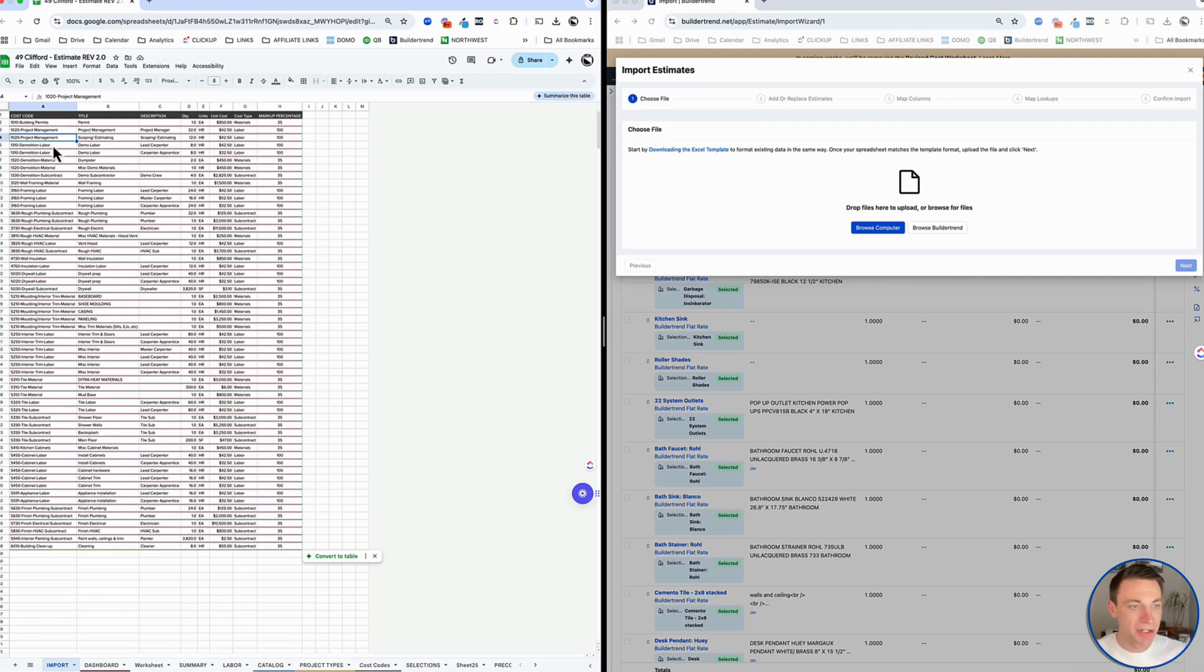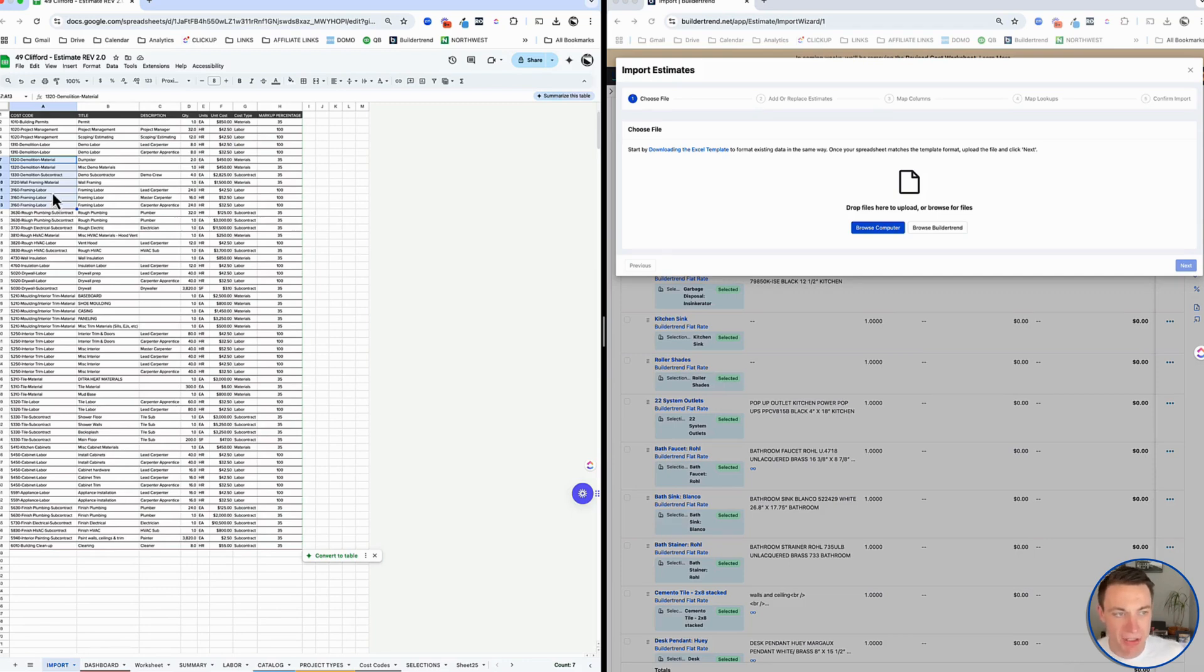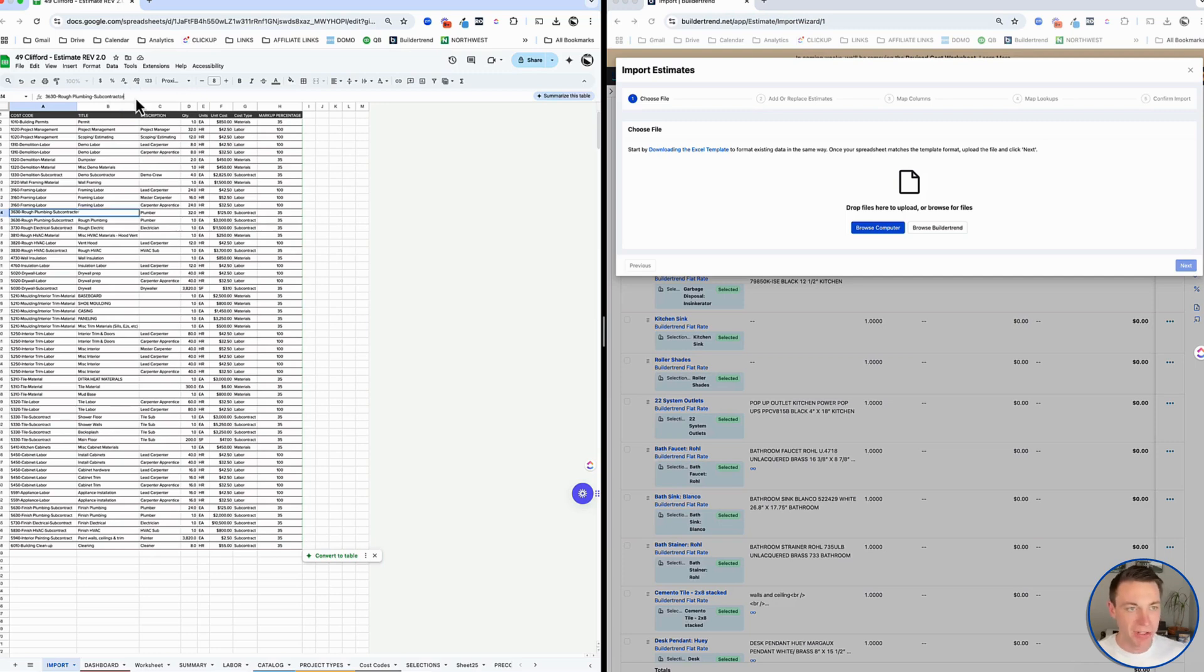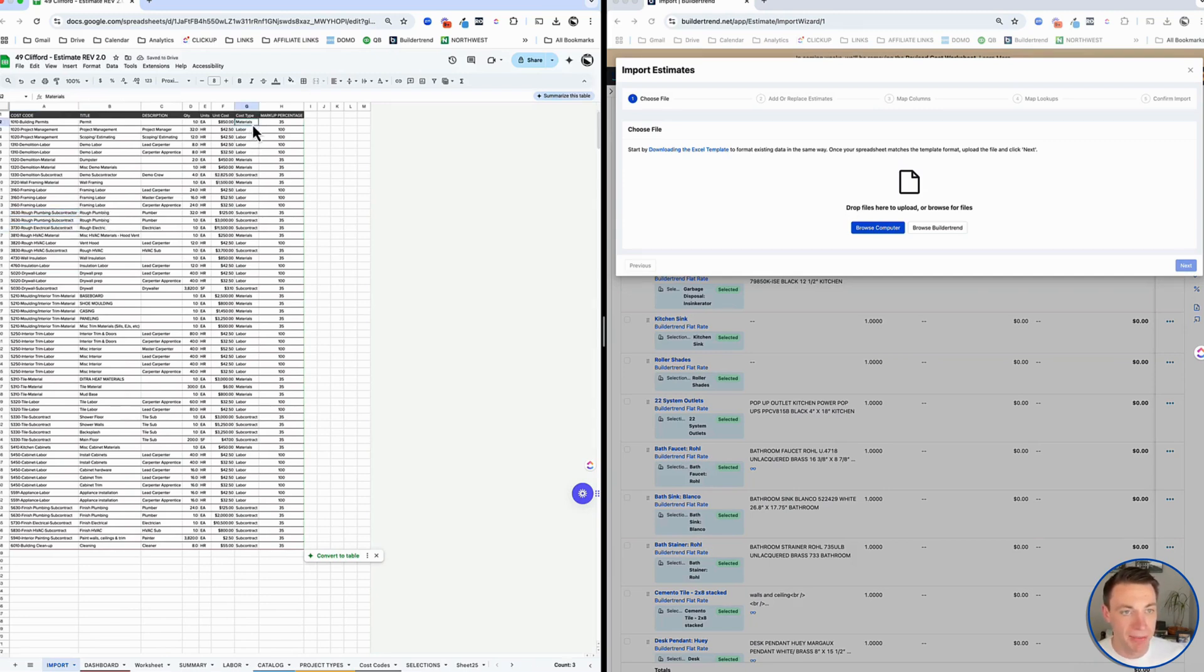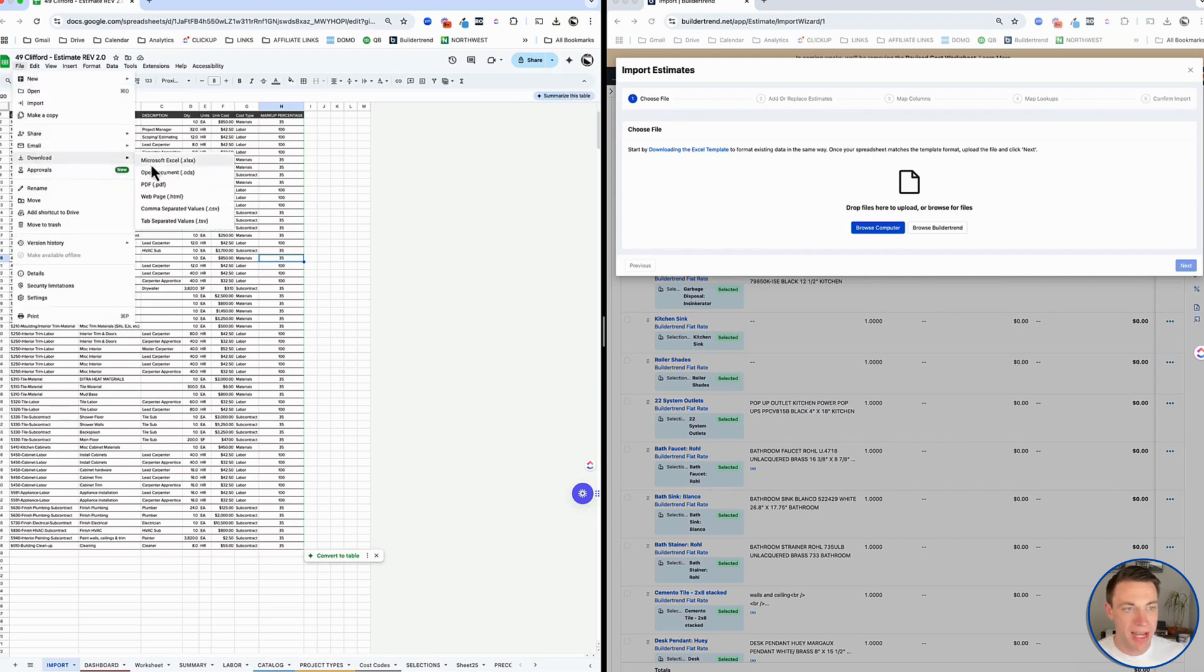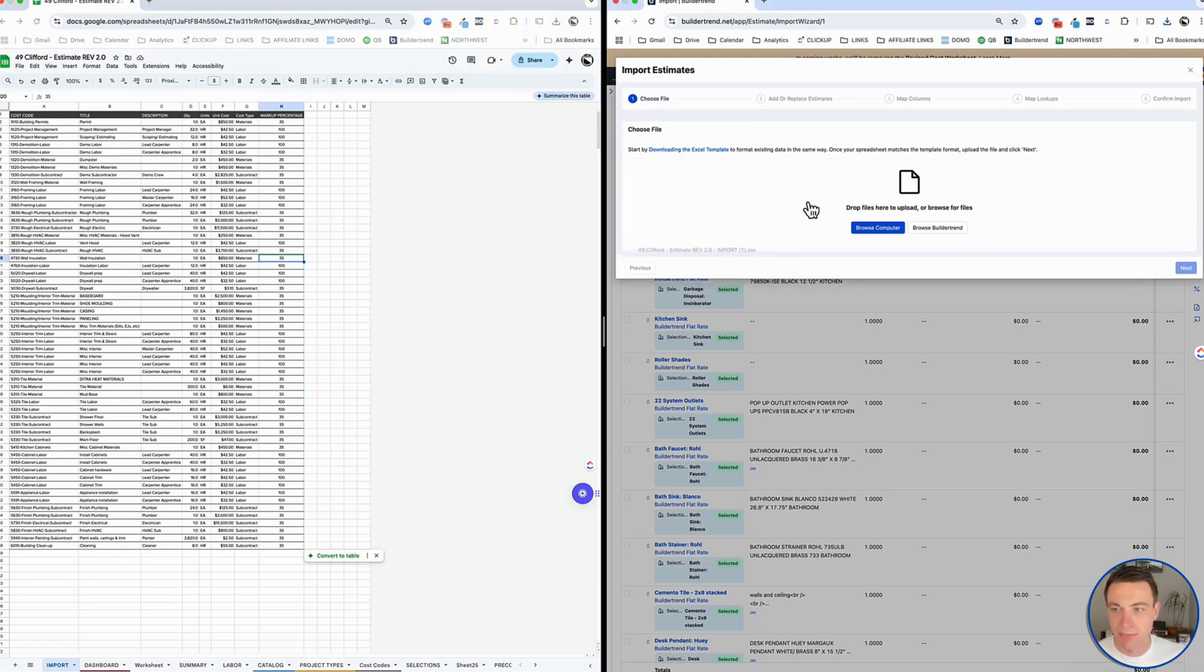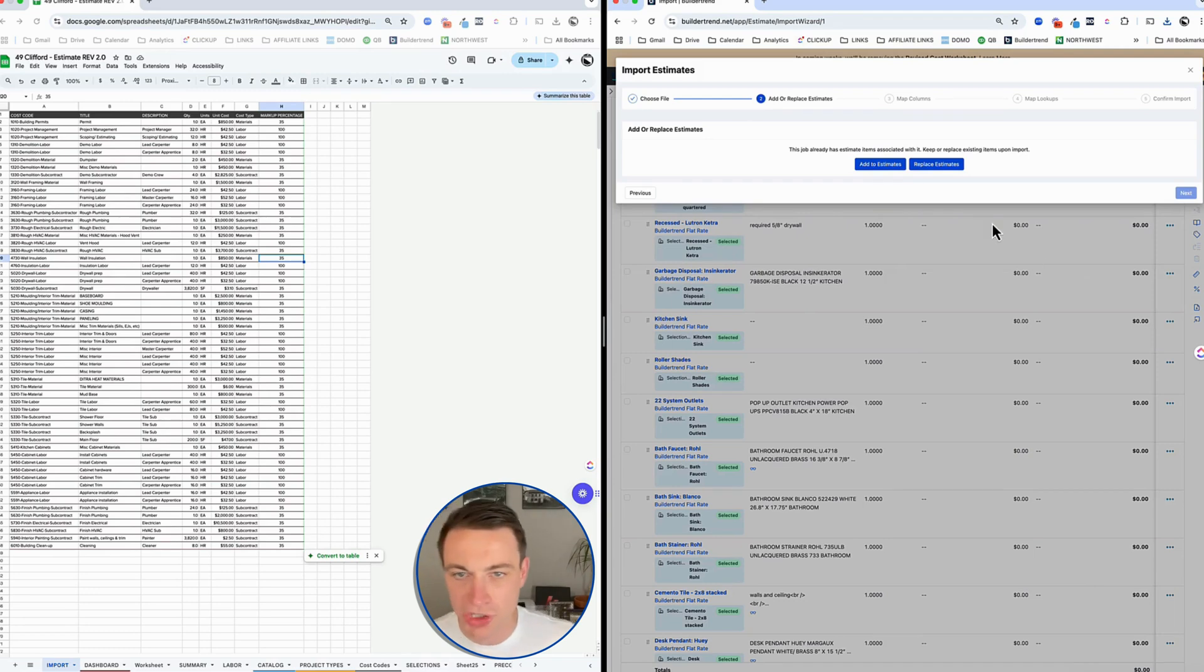I think I got everything in here. We're going to import this into BT. One thing that I'm going to do on purpose - we'll want to have spent some time making sure that our cost codes are equal to what's in BuilderTrend. We have a video on how to do that. I've already established that. The cost codes I've got in my estimate template, I've got a mirroring cost code over in BuilderTrend as well. I'm going to mess one of these up on purpose just to show you how it does a good job of mapping. I have rough plumbing subcontract. I'm going to put in subcontractor in there just to demonstrate how BT finds that mismatch for you. The other thing it's going to do is cost type. I've got materials here, plural. I believe they have it singular. I'm going to show you how that works. I've got this ready to go. I'm just going to download this as a CSV file.